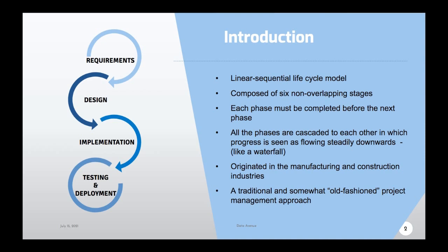The waterfall model is a linear sequential lifecycle model composed of six non-overlapping stages. Each phase must be completed before the next phase begins. As you can see in this diagram, the STLC phases start from requirements, then design, then implementation — and there is no overlapping at all. Once requirements are completed we move to design, and once design is finalized we move to implementation.